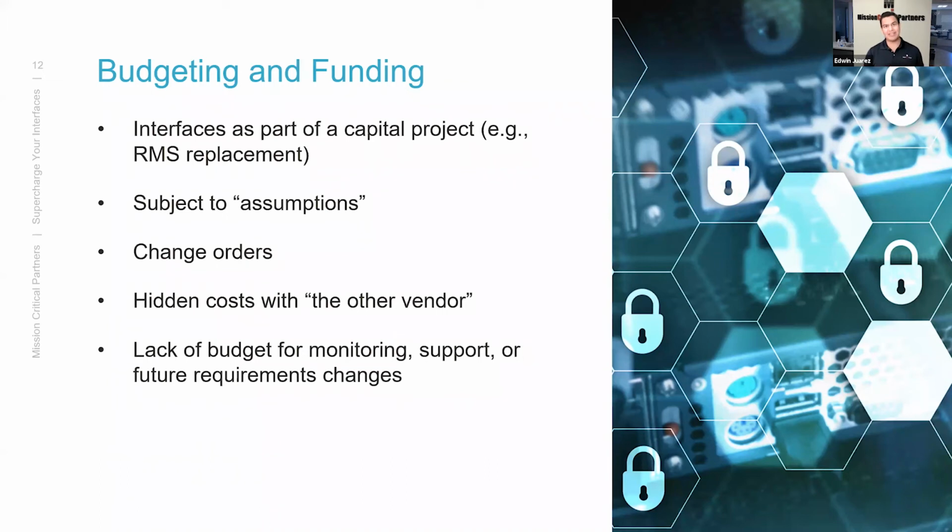As part of that, there's a lot of assumptions. I mentioned this earlier. Level of effort can vary based on what you know at the time about the integrations you want to achieve. If you're buying a new solution and you've never interfaced with this product before, but you know you want to interface with it now, there are a lot of assumptions, high levels of effort, low levels of effort, which can then create change orders. So your project management goes out and says, well, we didn't realize that this interface was going to be this challenging, so there's a change order we need to do for additional hours to do more development.